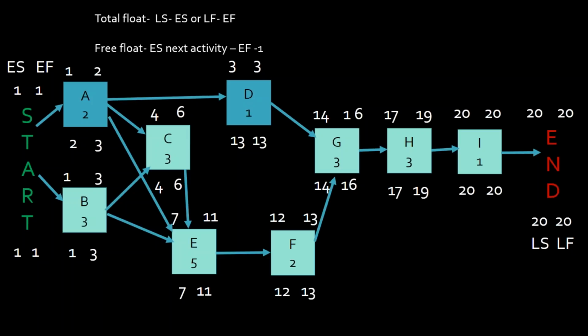Do not violate a dependency on the way back, okay? You do this because you want to identify critical path and identify those tasks that would have float. That's what the backwards pass does for you. So on the test, the forwards pass calculates duration. The backwards pass calculates critical path and identifies float activities.